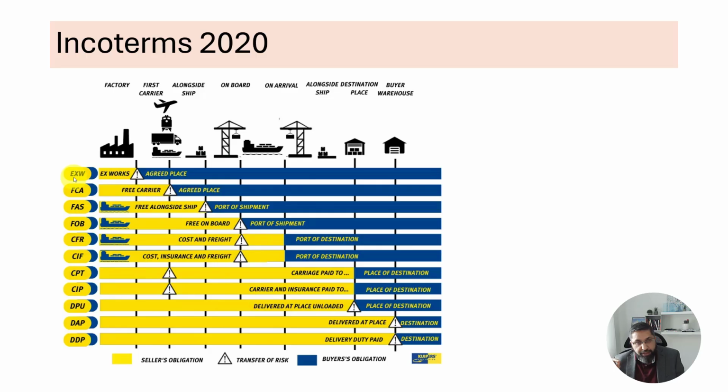So when you added the transportation cost of going from this new inland supplier all the way to the shore, to the port, and the old supplier was very near the port, when you got to the port, this new supplier was costing more than the old supplier because of that increased transportation expense.